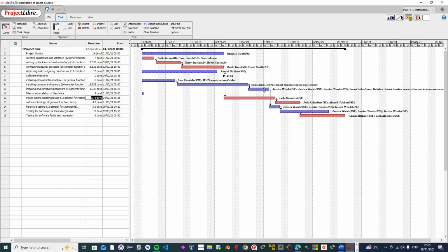So now we have to find out when the last installation is going to be. And then we put that at 0. All right. It's at 0. And this will be the end of our installation, which is our milestone.